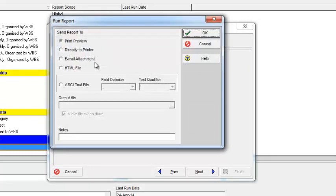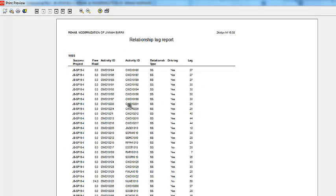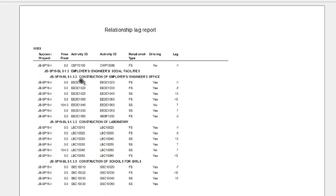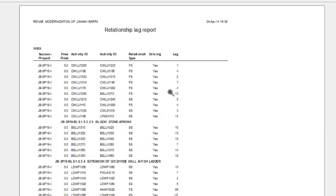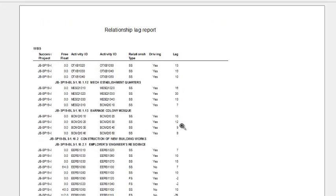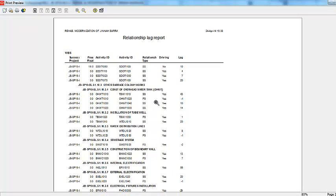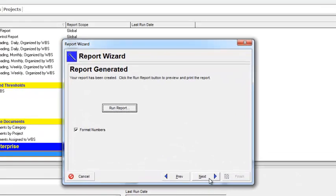Click Apply and OK. Click Next, and I will rename this report as 'Relationship Lag'. Click Next, then select Run Report and Print Preview. Now from here I can see the relationship lag of all the activities — what is the Activity ID, what is the relationship type, whether it is driving or not, and how much is the lag of each activity.